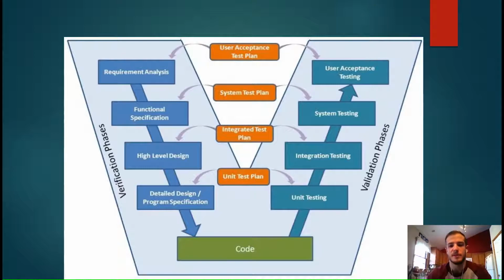A pro of the V model is that the parallel sections almost work in a pair, whereas the information or design or anything produced from the left side of the V model can actually get recycled into the parallel pairing on the right side of the V model, which is a big plus. So first we have the requirements analysis and user acceptance testing. This is where requirements are collected and analyzed. And then the pairing aspect of that is that it can be flipped and used for input for testing, the user acceptance testing, with the goal of verifying the end system meets the needs of the users.